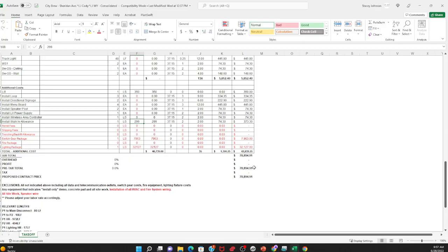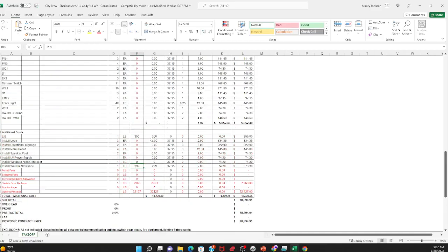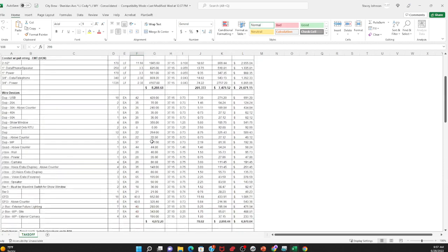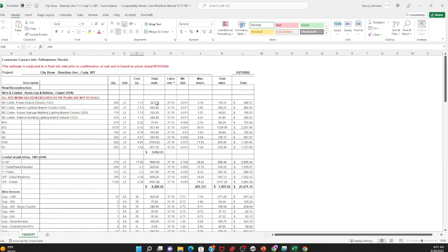That's supposed to be out of pocket, and I really don't add very much markup on the material, but you could even add a markup on the material. You could do it within the Excel spreadsheet, actually, because this is an equation. We could say that times 1.1, right? If you do it times 1.1, you've added 10% to your material cost. You're multiplying it by one, and then you want to add 10% more, so it's 1.1.